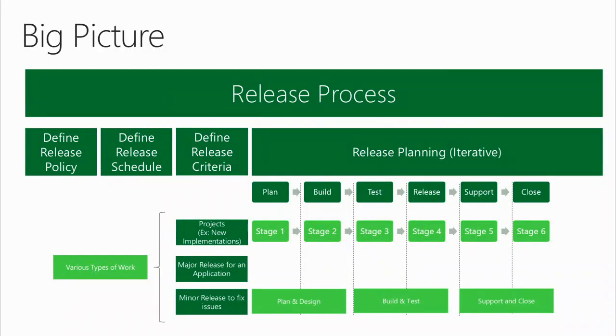Release process, the way I have learned about it, the way I see it in many organizations work, project management is a subset of release management. Projects are managed from a definite start to a definite end. Release management is an ongoing process. Yes, it does have a per-release start and finish, but the process itself, the framework, the methodology pervades everything.